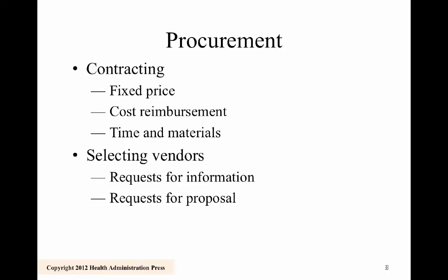Now we mentioned a little bit about procurement. How are we going to take care of this project in terms of resources? Are we going to contract out with a vendor to have this done? And if we are, well, then do we need requests for proposal or requests for information? And if we're going to contract to have it done, maybe how much time and materials is it going to take or cost? Are we going to have some fixed price? Or are there going to be other contingencies involved? Maybe they hit specific targets, and so they get more money if they hit the targets. They get a bonus.